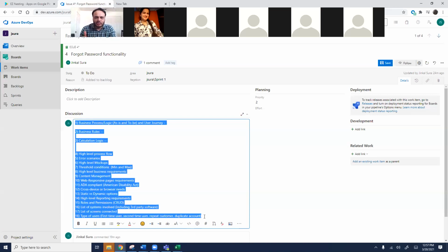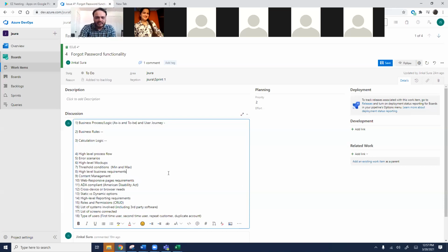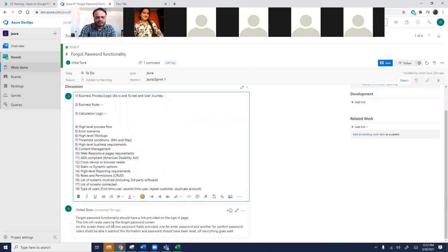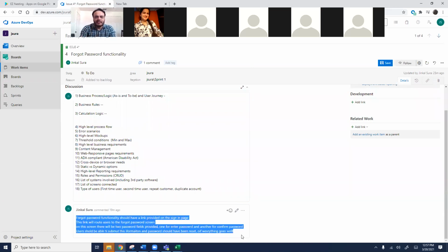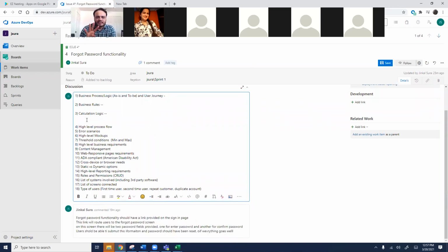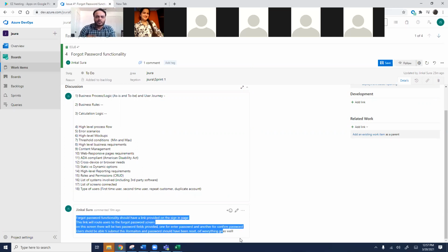We're going to write 2 to 3 good stories. We need to tell them, hey, it took me about 5 hours to write this one user story. And when I gave you a story like this, it took me only 15 minutes. So I want you to understand, if you want this level of details in every single story, I can only give you 4 stories in 2 weeks. Is that okay? If not, then what can we remove from this to balance it out with what we have here? Those are the kind of discussions we need to get into. But again, this is not in first 1 month or first 2 months. This is after that. Are you guys following?